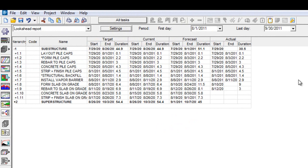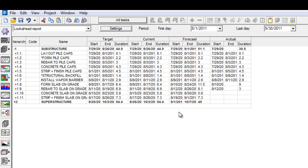We can use the Look Ahead Report to assess when and where tasks have started and what the future and forecasted start times will be for each of those tasks. This is a very useful tool to distribute to superintendents so that they have a better understanding of the impacts of the baseline comparative to the forecast. They can use these dates to manage the project in such a way that provides a very concise and unique time format.